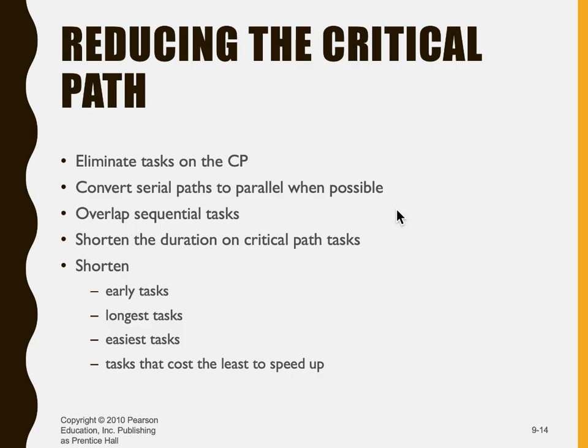For example, a person could multitask. Also, shorten duration. Sometimes through experience, rather than doing a task in 10 days, certain project subtasks could be completed in 8 days, for example. And other things like shortening early tasks, longer tasks, easier tasks, and cost.